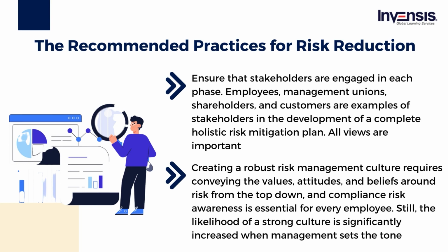It is essential to create an environment in which team members feel at ease raising concerns to upper management without fear. You should escalate one problem at a time to a single stakeholder. You should only include stakeholders that are affected by the issue when escalating concerns. One should assess the problem's severity, provide contextual information, and recommend remedial methods.